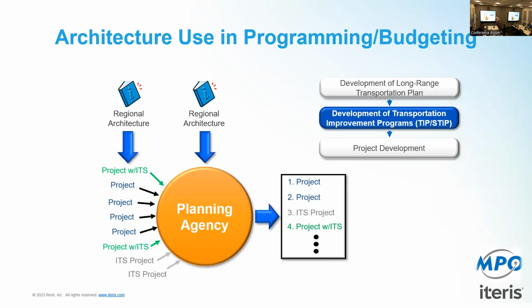You start looking at how projects need to be looked at differently from the standpoint of not just the whole thing. There may be a difference: this project is going to give us something I need to leverage for this other project. So this project needs to come first. If I do it backwards, I'm wasting time. The other project's not going to be able to deal with it. And ITS is very much that way. It's a very integrated environment.